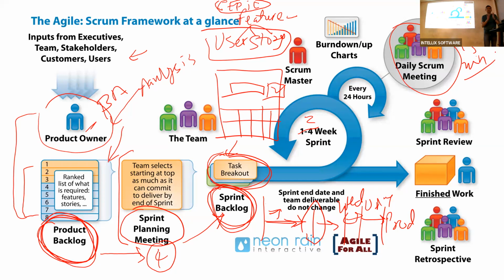Everybody says who is doing what today, what they delivered yesterday, and so forth, so that everybody knows: are we on track to deliver the project? Because they don't have formal project plans, like waterfall type project plans. So that's the daily scrum meeting.